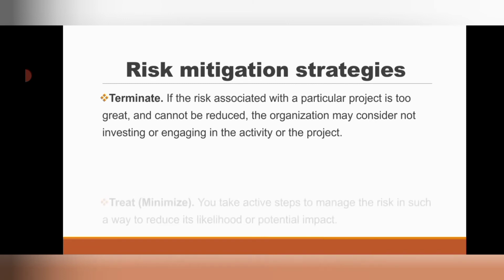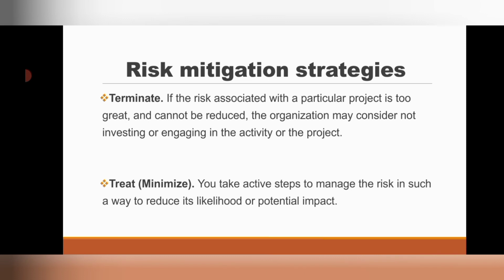The last of the four T's that can be used to mitigate project risk is treat, or in other words, minimize. That is where you take the necessary action or the steps to manage the risk in such a way that it will reduce its likelihood or its potential impact on the project.